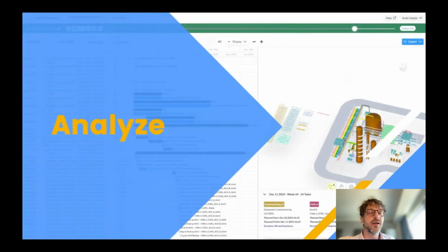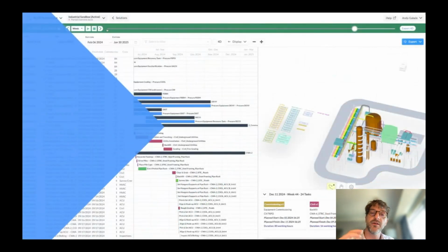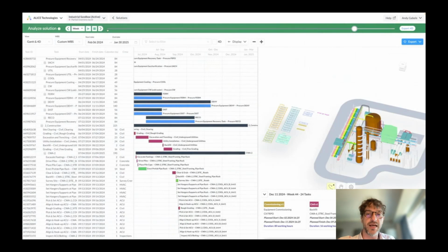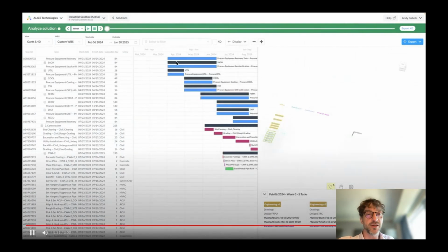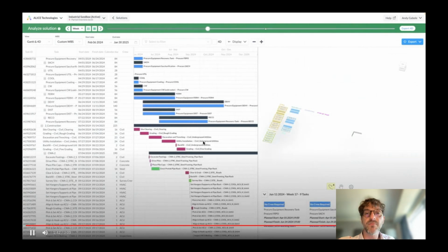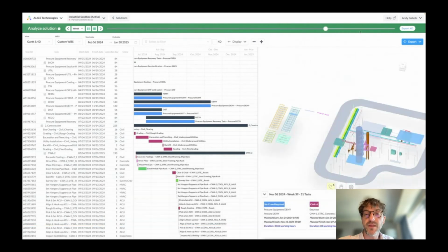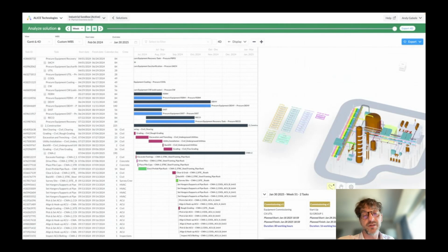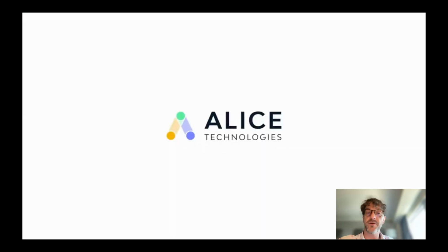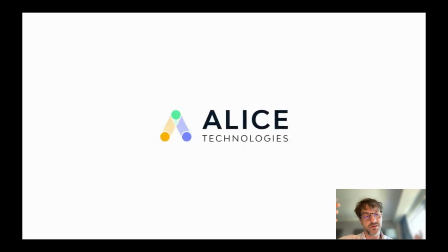And then what you can do is click on each of these dots. As much as I like to joke, they're great as abstract art. But when you open those dots, you get an automatically generated schedule. And then here on the right side, you're seeing an automatically generated 4D. So that's what I've spent the last 14 years building. So that end-to-end: import the BIM, upload constraints, simply import your schedule, run lots of simulations, add cranes, add crews, change overtime, whatever it is, shuffle resources, increase, decrease float, and it then spits out the optimal solution.